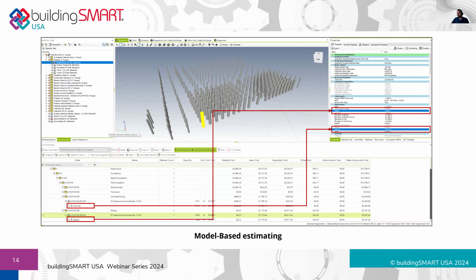On the other hand, you should probably reduce your detail level for everything that is not as important for the construction, that could be calculated, as the paper infers, by inferring to certain model elements that already exist in the model, that could give you a reasonably accurate picture of what you have on the project.